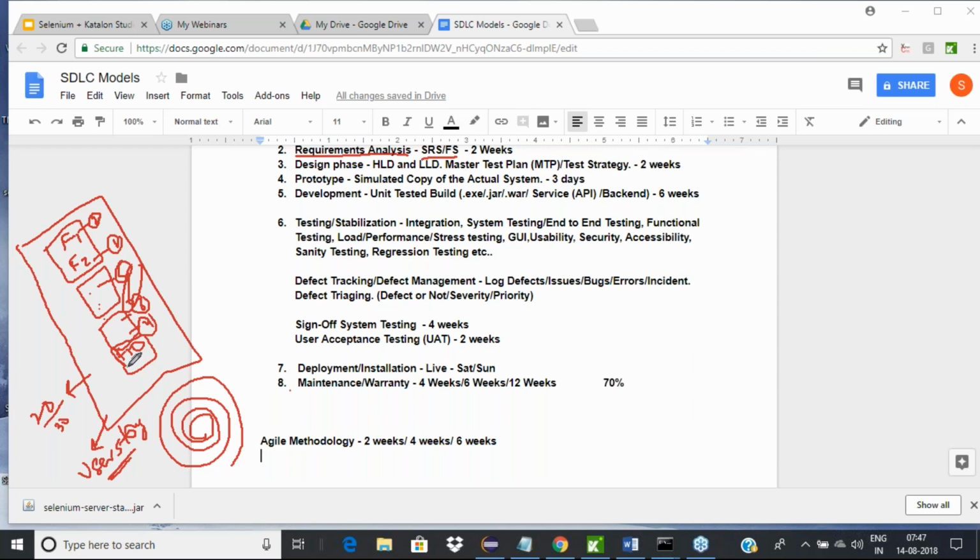I may cancel it from a web application, from a mobile application, or maybe from my personal assistant device, etc. So you'll have those different categories explained, and the story will be described. The requirement is described like a story, and the story will have the expected criteria, which we generally call acceptance criteria.